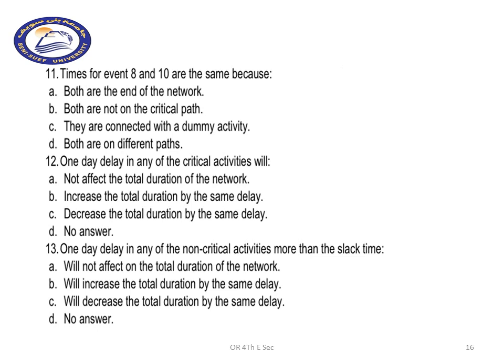Question number 13, 1 day delay in any of the non-critical activities. If we stopped here, the answer will be, well, no effect on the total duration of the network. But we will continue the question. 1 day delay in any of the non-critical activities more than the slack time. So we can delay the starting of any activity that has slack time. But if we delayed more than the slack time, what will happen to the whole duration of the project? It will increase the total duration by the same delay. So the answer here is B.